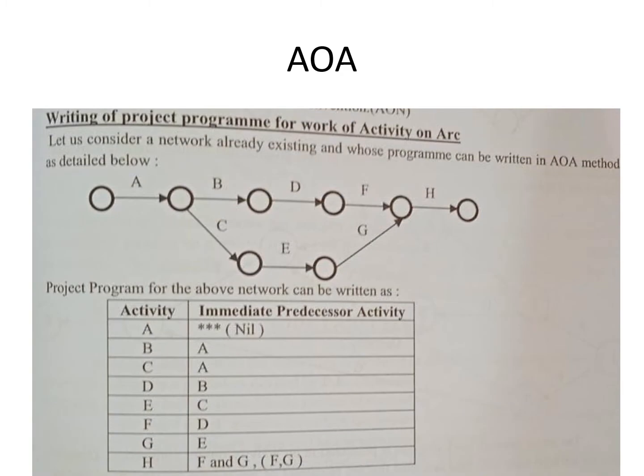So over here we have a diagram of activity on arc. Now typically, as the process called for, you have the activities listed and arranged. So you have all these activities listed and arranged over here, right? And you also write down the predecessor activities. Because A is the starting activity, it does not have any predecessor activity. Obviously, if an activity is the starting activity of a project, then it cannot have a predecessor activity.